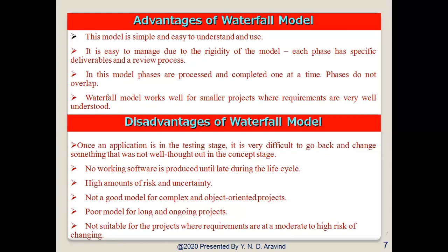From this we can say the project requirements can be stated unambiguously and comprehensively. So project requirements are stable. When the project's requirements are stable or unchangeable during the system development life cycle, in that sort of application only, we need to go for the waterfall model.